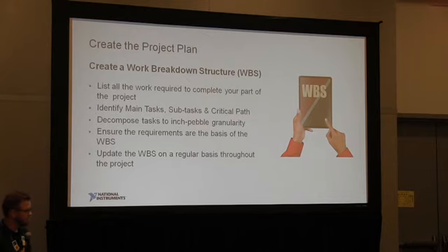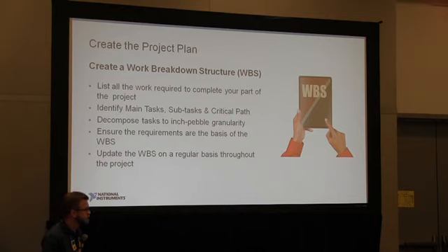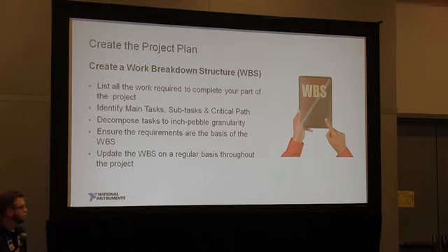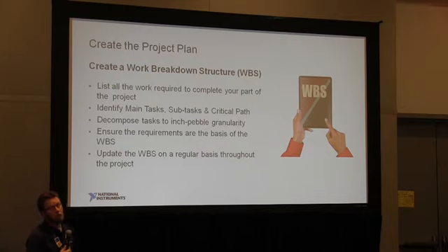Absolutely, sure. But the hope is that the whole team will be plugged into the activities defined in the work breakdown structure. Our intent is not that it's a document that you create and then set aside. It's a living document. You visit it daily or weekly, you have team meetings, daily scrum meetings or weekly team meetings, and you find out, Ryan, where are you at on this task? Okay, I'm 50% complete, or I'm 75% complete. And you track the progress of each of those items.